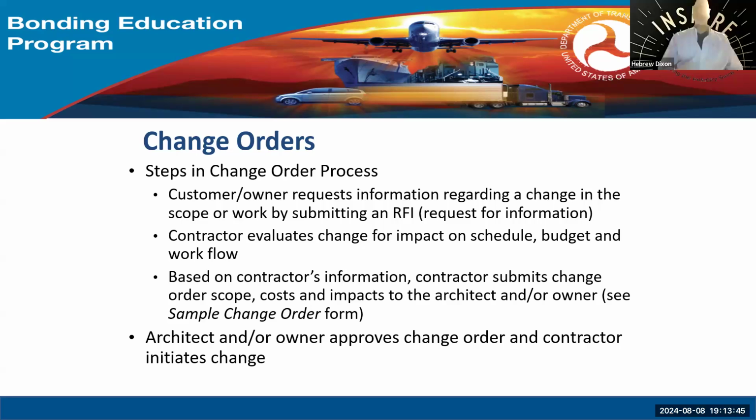This is the hardest part of a project, my brothers and my students, because it makes you work every day. Just like the DCR, you have to book a request for information. We could have a whole class on cost control procedures, but for practical purposes tonight, RFIs are the first thing you do when you find out something is different than what you thought it was.